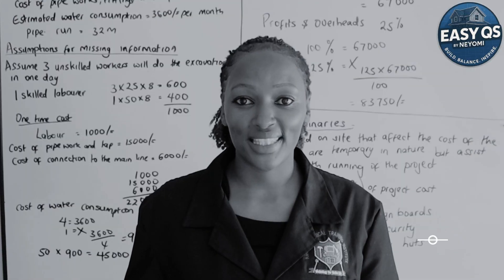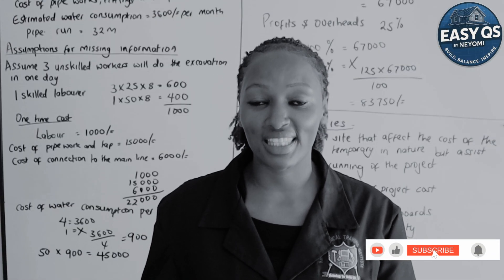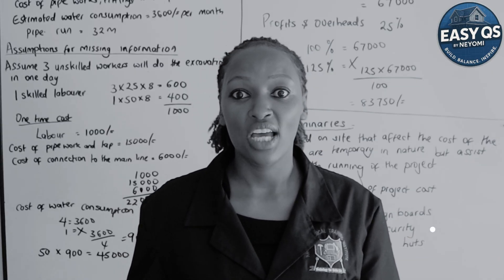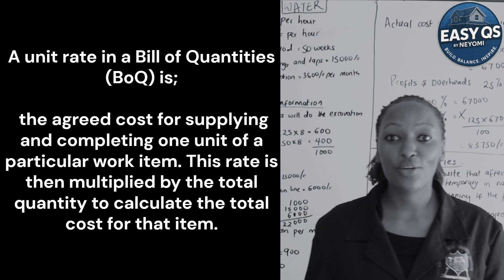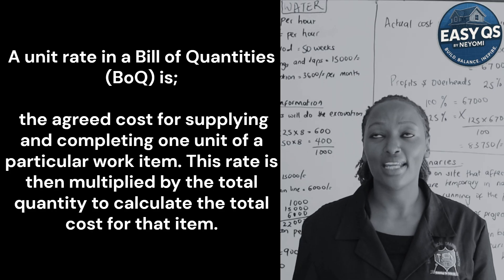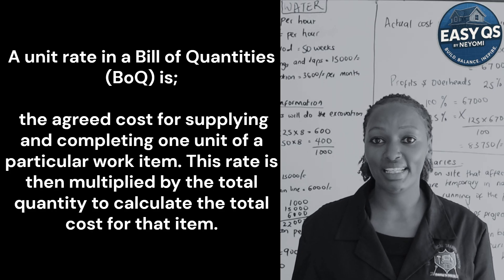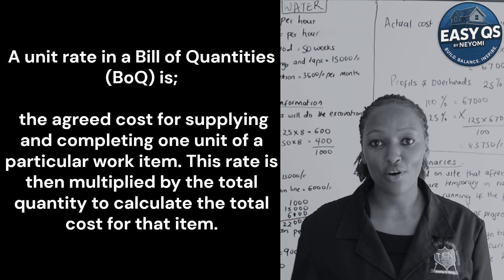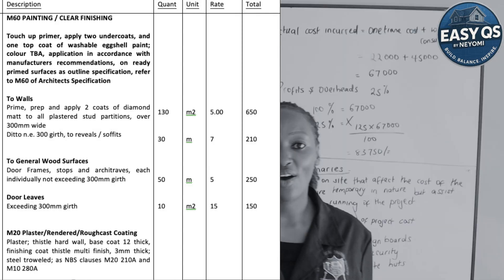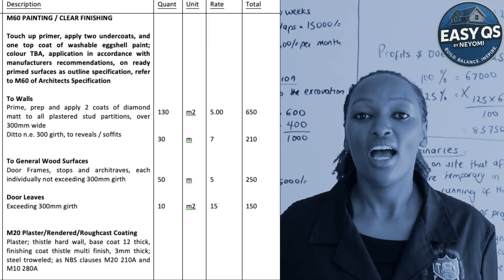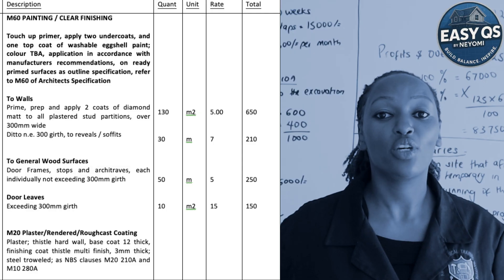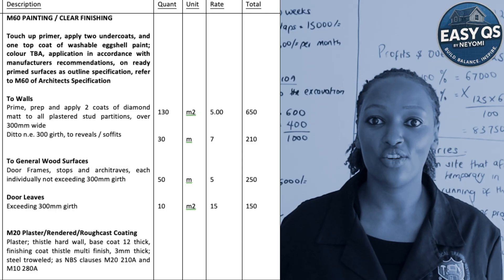I want to take you step by step to understand what unit rates are, where they are used, and how they are calculated. Unit rates are the cost per unit. When we are measuring buildings and all elements — walls, concrete, floor — we price it per unit. A unit could be a meter, a meter square for area, a cubic meter for volume, or a number, for example how many doors.